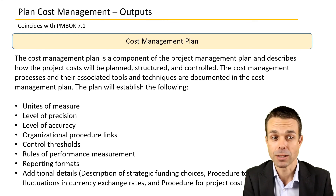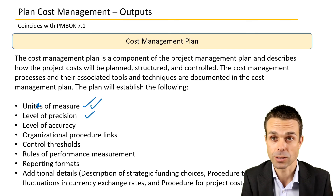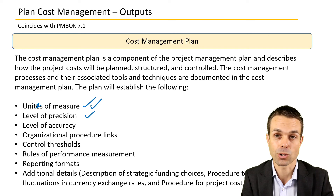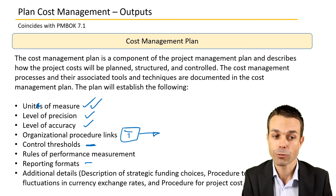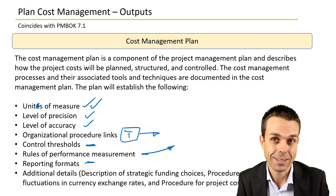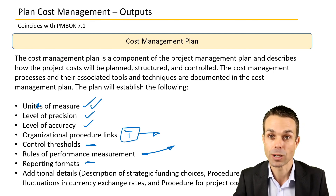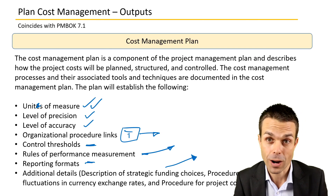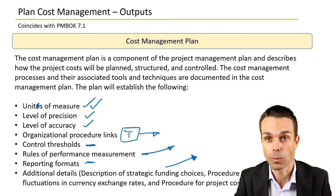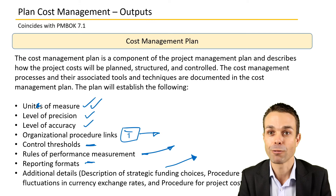The output for Planning Cost Management is the cost management plan itself. It will establish: units of measure, level of precision (whether accurate or still an order-of-magnitude estimate), level of accuracy, organizational procedure links including templates and formal processes, control thresholds, reporting formats, rules of performance measurement, and additional details such as strategic funding choices, and procedures to account for fluctuations in currency exchange rates — for example, whether to hedge currency or include a contingency in the contract for a long project. These are all the details as part of Planning Cost Management from the PMBOK.